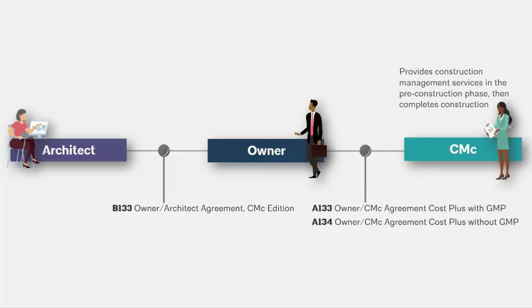But also retain a CMC. And the CMC is going to differ from the CMA because that CMC is providing services beyond advising and is actually going to build the work. So they have responsibility over the work via direct contracts with subcontractors.